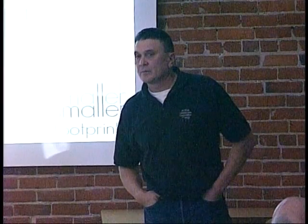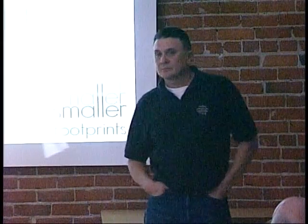No, Mike, we worked on the Banner Bank, and we worked on a project at Gary's right after Banner Bank was finished. He chose not to use a commissioning agent on that project. I think he needed to save a little money. So right then he could save some money, but as we're seeing now, later on is when you pay for that. Exactly. And that's a good point.